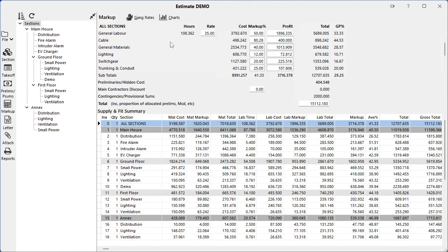So what this will actually do is allow you to pick your different skill levels, say how much time they've been spent on the job at the different rates, i.e. time and a half, etc. It also allows you to enter your travel costs either as a GRB rate or as a mileage rate. And if you're working away from home, then you'll probably have some lodging costs to be incorporated there. It all goes into the mix, and then what it will come up with is an hourly rate that it will cost to employ those particular skill levels on that particular job, wherever it is. So a lot more accurate on the labour costing.